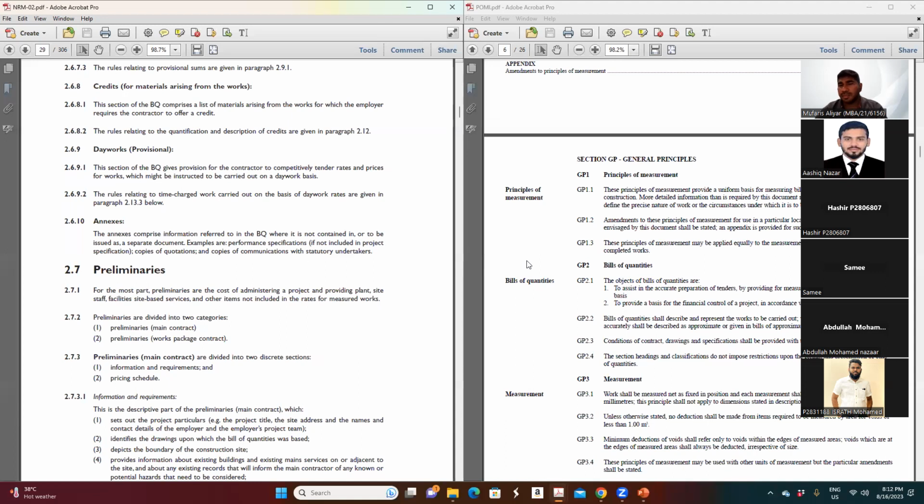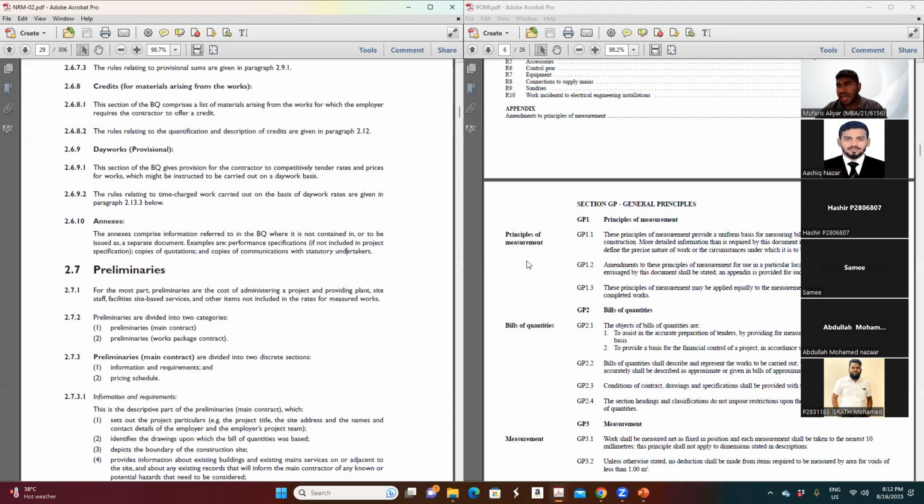During the design phase, as an architect, and I'm a specification specialist in the company, we already had a discussion with the suppliers for any materials. For example, flooring, wall finishes, ceiling finishes, painting, everything. We know the price because I made an estimation for the project. So I know the price, how much per square meter of porcelain tile. I know how much per square meter of paint.